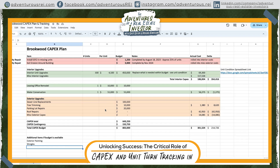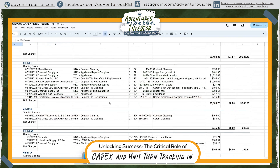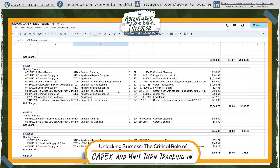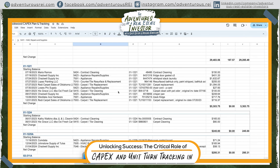Exterior upgrades include things like sewer liner replacements, tree trimming, and parking lot repairs. On the right-hand side I have actual costs listed. There are other tabs that feed into this sheet. In the interior CapEx tracking tab, I have everything listed by unit number. Every month I get general ledger information for specific code items — like contract cleaning, appliances, and repairs — so I know exactly how much it's costing us to turn each individual unit. This also lets us look back: if we turned a unit in 2023 and it cost $5,000, but now we're replacing the carpet again, we can ask — did we charge the resident back for those items? That gives us more granularity and accountability.